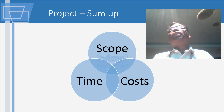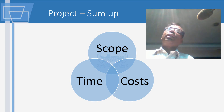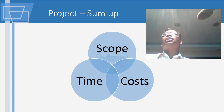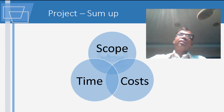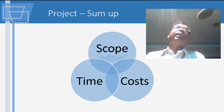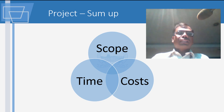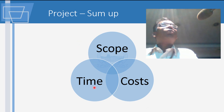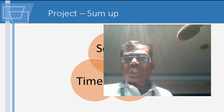A project is made up of scope, time, and cost. Scope means there is a defined activity that starts the work and a defined activity that ends the work. For example, if you get a contract to lay a road, it starts from the base course preparation and ends when road signage and markings are complete. Adding a pedestrian bridge would be an addition to scope.